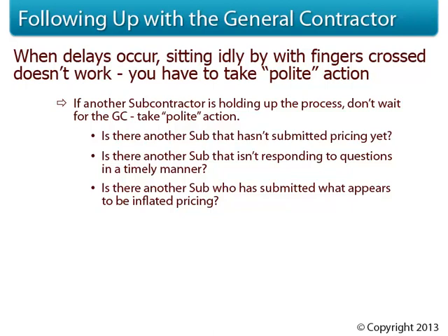However, if the general contractor thinks this is a big issue that's going to take a while, request that your portion of the change order request be separated from the pack and handled individually. This is a pretty common way of handling situations in which there are multiple subs involved with the request, but only one of them is holding things up. This is a big hassle for the general contractor, so they're not going to do it unless requested. This won't always work. Sometimes owners will refuse to allow segregated pricing, and in those cases, fighting might be more trouble than it's worth. You have to make your own judgment calls. But nevertheless, you should never stop trying.